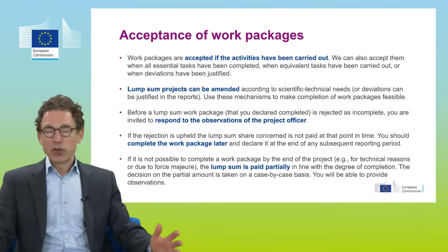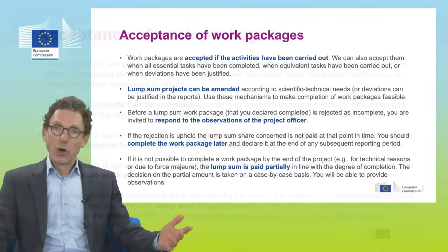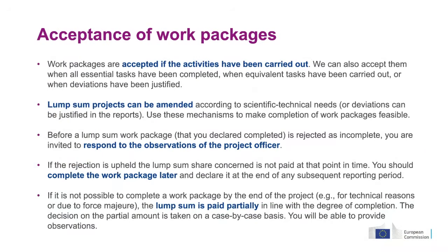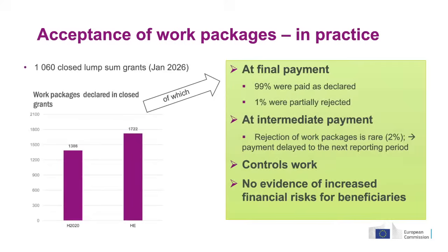If it's not possible to complete your work package, you would normally have to tell us why that wasn't the case, because we really want you and we expect you to complete the project in full. So there should be either force majeure or a technical reason explaining why you were not able to really complete your project or individual work packages. And if that is the case, and normally your technical reasons will be accepted for this, I'd say, then we can accept your lump sum partially.